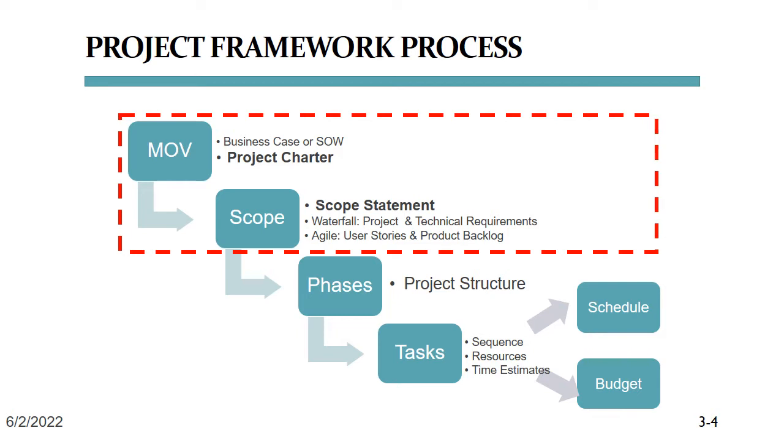If our organization employs an agile framework and the project vision and mission are complete, we can start writing user stories, which describe how our users experience our product and derive from them use cases that describe user actions with their technical functionality requirements. These user stories and often use cases are collected in the product backlog, which looks very similar to a technical requirements document.